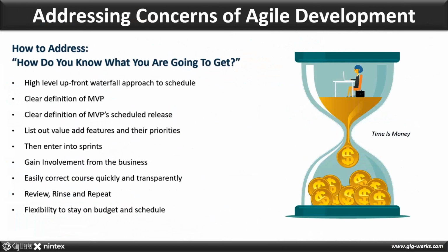So how do you know what you're going to get? So what we've done, and I've lovingly referred to as semi-agile, is that upfront, to satisfy your cross-constituents, IT, the budget office, procurement, and the users, you do some level of what would be more like waterfall planning, but it's high level. You capture what the requirements of that minimally viable solution are going to be.